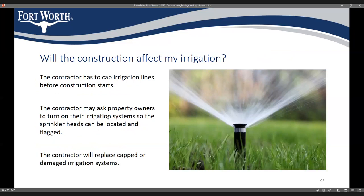Some of you may be wondering how we deal with existing irrigation systems. If your existing system is near the street, the contractor will have to cut and cap your sprinkler line prior to construction. Whether the contractor breaks your irrigation during construction or caps it prior to starting, they'll be the ones to make it right before construction is complete.